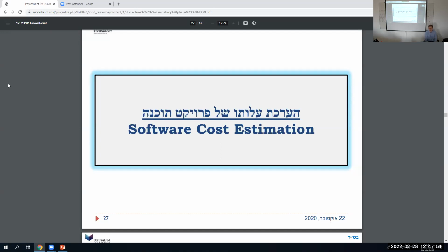But then they said, wait a second. Another project also had 100,000 lines of code, but it cost $2 million. So they asked, what's different about these two projects? They figured out what parameters cause projects to be more or less expensive. This had a team of highly skilled people, this had a team of less skilled people. Or this was a real-time project, and this was an information systems project. So they came up with characteristics of projects, which we call cost drivers, which caused the projects to cost more money or less money.